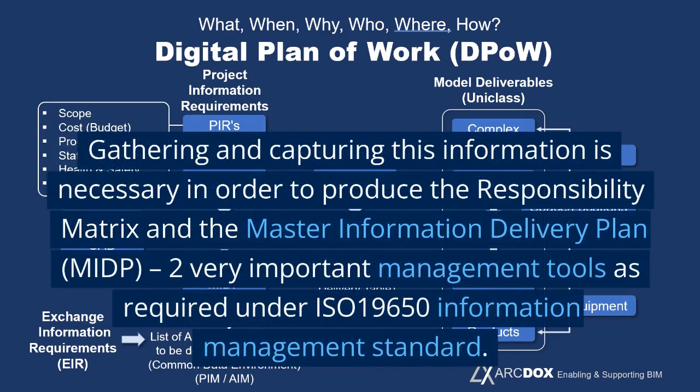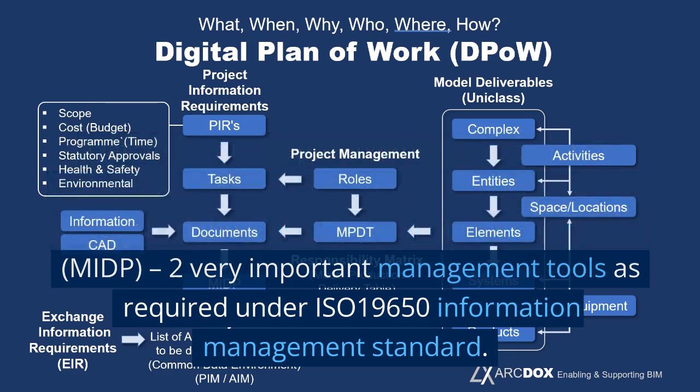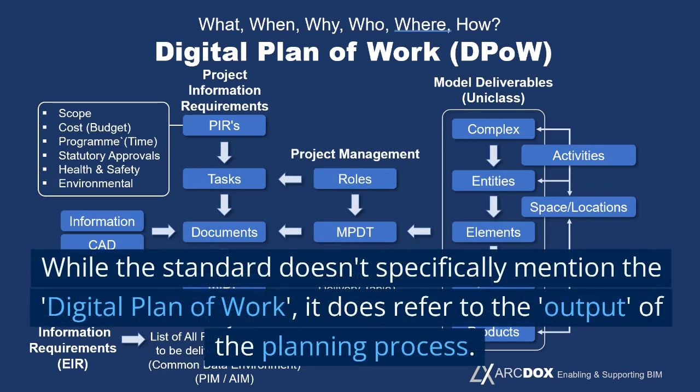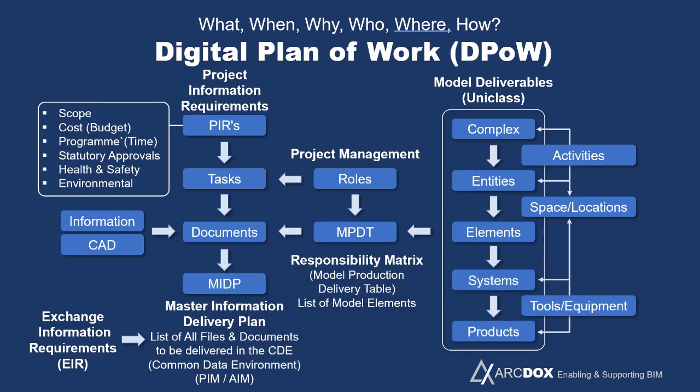Gathering and capturing this information is necessary in order to produce the responsibility matrix and the Master Information Delivery Plan, MIDP, two very important management tools as required under ISO 19650 Information Management Standard. While the standard doesn't specifically mention the digital plan of work, it does refer to the output of the planning process.